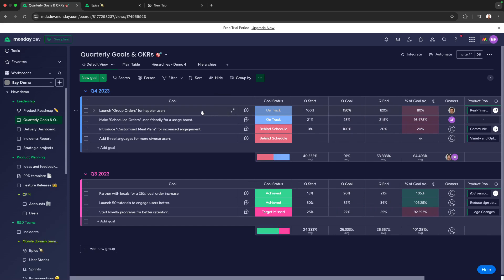To set it up, you need to first connect your user stories to your epics and your epics to your initiatives, and those initiatives to your roadmap, using connected columns to link each of your boards, all the way up to this bird's eye view. Once done, we can get started.